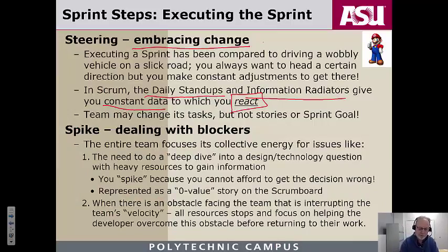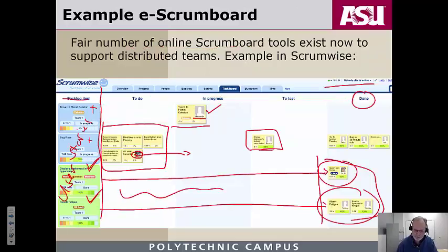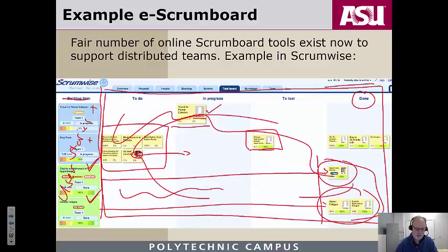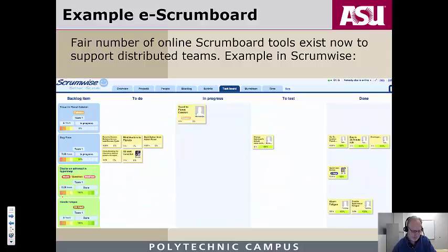Right? Are teams fully part of the steering? Are teams again fully empowered to change the task? So anything that you see in here in the task area, the team can change anything. Team owns these tasks all the way in here. The team doesn't own this area. This represents the agreement. And you know what? I'm going to clear this off again so we can see it a little better. So team owns tasks.